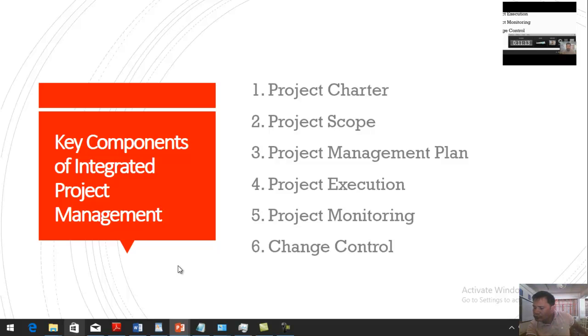Beyond dealing with changes, this document also defines the criteria for evaluating change requests and measuring their impact on the project performance. If a change request is deemed disadvantageous for the organization or the project, it can be rejected, delayed or deferred.